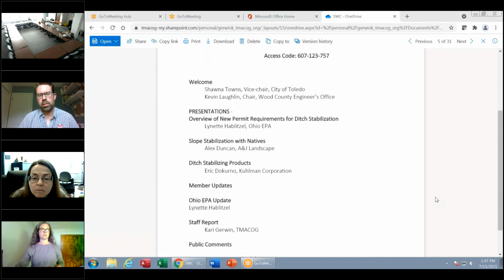So there are mixes available. I could recommend a couple and send that information out, the ones that I've used and had success with. From a cost comparison, they are more expensive than your regular grass seed. I'm trying to think off the top of my head, maybe 4 to 5 times more expensive per pound than a grass seed. I mean, there's some that are pretty close, maybe 2 to 3 times. So there are some options there. So you are talking more cost, but I think it's not that consequential when you're thinking of the project as a whole.